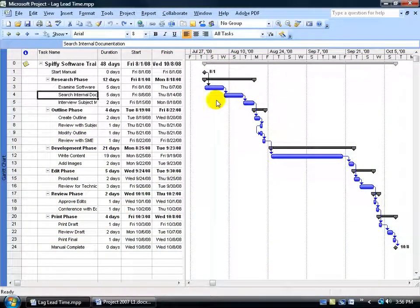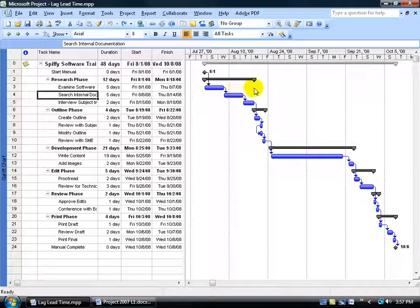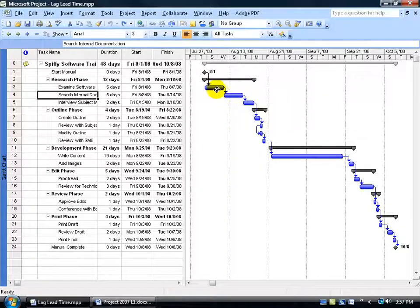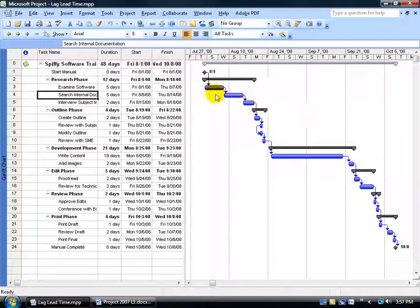There may be times where you want to delay time between your tasks. That's also referred to as lag time. In other words, you don't want to start one task right after another. You want to give it minutes, hours, days, or even weeks. Lead time is where you want to start one task before its predecessor has finished. Let me give you a couple of examples.